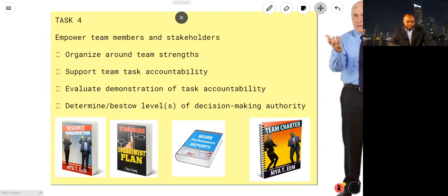In fact, a lot of my students in our Agile classes, they ask the question, but how come there should still be a manager? And they think the Scrum Master means project manager. No, it's not. The Scrum Master is not a project manager because the project management responsibilities are different. Things like budgets and reporting and things like that, that's project managers. Scrum Masters don't do that. Some people think Scrum Masters are responsible for reporting. No, they're not. You know.